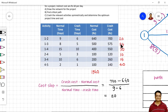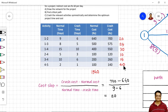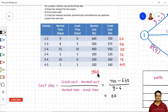Similarly, I have calculated the cost slope for each of the remaining activities. This is essential to select the activity for crashing — we will always select the activity with the least cost slope for crashing first. The total normal cost for this complete project is 940 rupees.